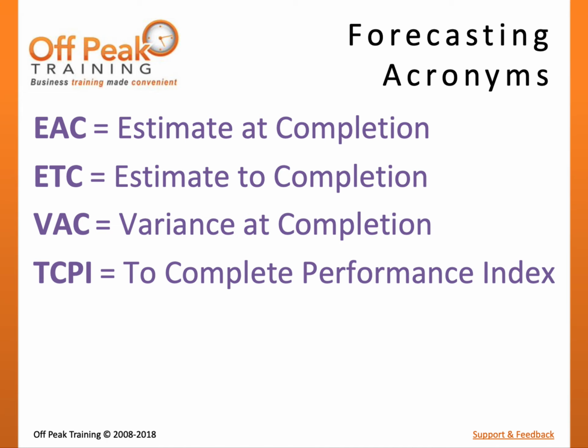Finally, TCPI stands for To Complete Performance Index. This represents the rate at which future project work must be performed in order to finish the project at plan. In theory, we hope this number is at 1.0, representing 100% work efficiency. This would mean that we need to perform exactly at plan to finish at plan.